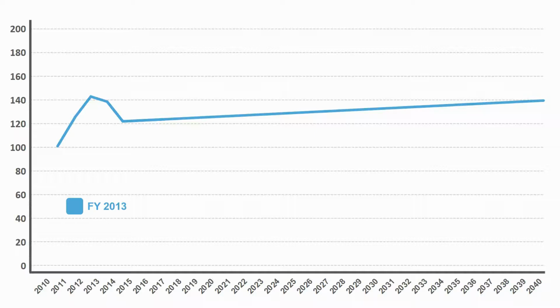Now, let's see what we would forecast the price of the same barrel of fuel in fiscal year 2014 dollars for 2040. The forecast for the first year escalated at only 3.1%, compared to the forecasted 15.3% from the previous year's guidance. While we expected the price to be about $140, shown in blue, we now expect the price in the exact same year to be only $127, using updated fiscal year 2014 guidance, shown in red.